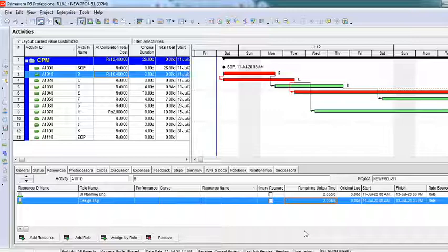When you click on add, a new currency is added, and the moment it is added, you can start typing. For the symbol you can give RS. The currency name you can give as Indian rupees, and the representation of that could be INR. Do not change the exchange rate, let it be 1. If you have assigned the cost in dollars and want it to be rupees, do not change any exchange rate, let it be 1.